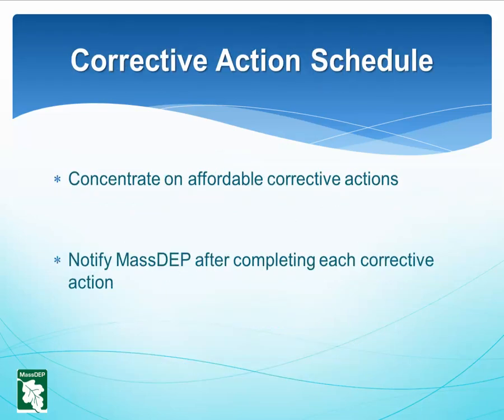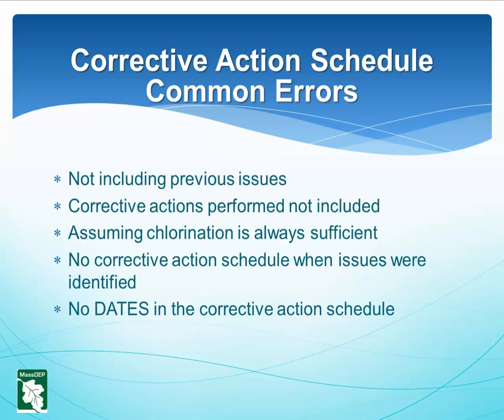When taking corrective actions, do not include wish list items or work you cannot fund, because these will be enforceable. It is the PWS's responsibility to notify MassDEP when each corrective action on the schedule is completed. Common errors in corrective action schedules include: not including issues identified in previous inspections even when relevant; failing to include corrective actions performed; assuming chlorination is always sufficient; failing to include a corrective action schedule even when issues are identified; and not including dates in the corrective action schedule.